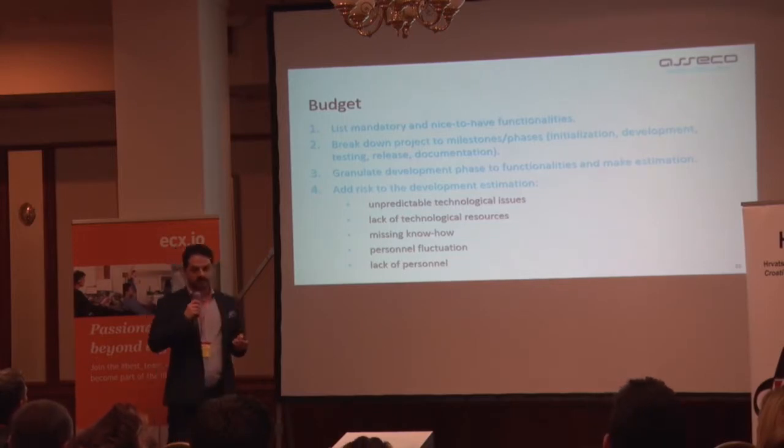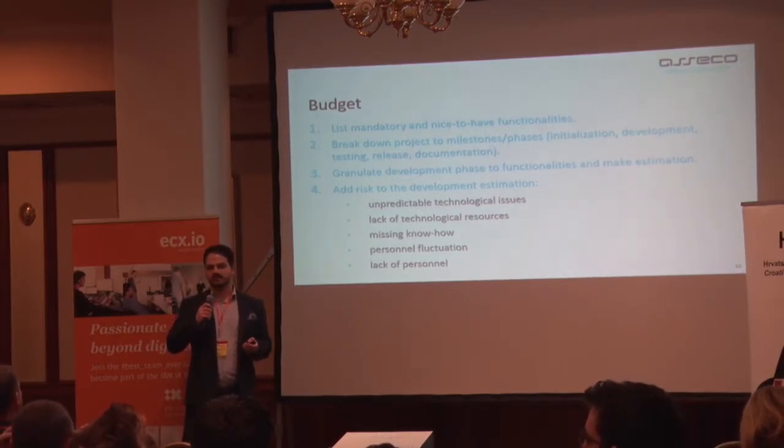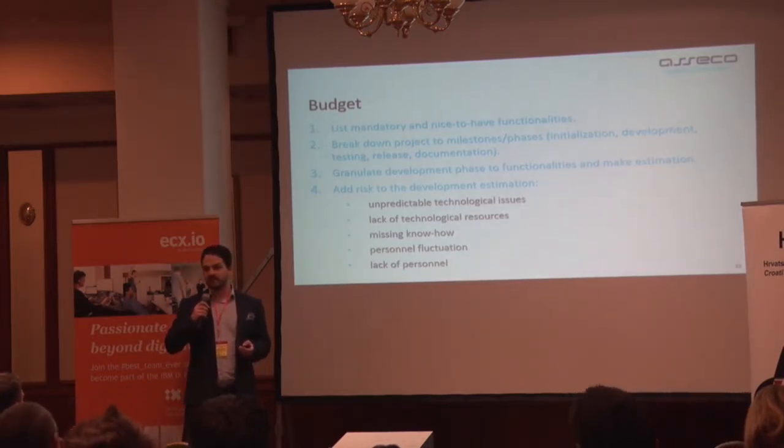So how to make the budget? List your must-haves. That is something that you're promising your stakeholders that you must have. What is the mandate of the MasterCard water specification that you must have? Then you add the nice-to-haves, and you add risk to them. And then you hide the nice-to-have inside of the must-haves. So you have to become the master of whys. But you will say that your sponsors may challenge you, but you'll figure out how to hide it. Trust me, it can be done.